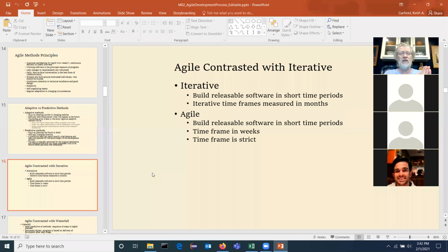It says, we need to have 100 features that we've identified with the software. Of those 100 features, 70 of them are needed, and the other 30 are really nice to have. But if you just deliver the product with those 70, then we're going to agree that that's a functioning product. So we're going to shoot for all 100. And so you do your 2 weeks, 2 weeks, 2 weeks, 2 weeks, 2 weeks. Eventually time runs out. And what happens when time runs out? You look at what you did and you say, well, we got 80 of them. The other 20, we're just not going to do.